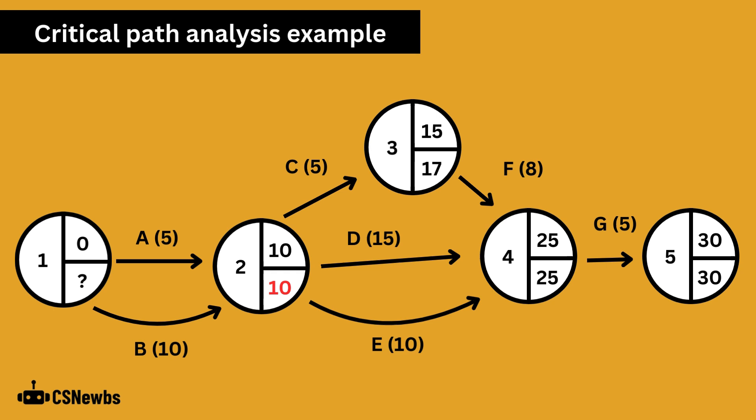The latest finish time of node 2 is 10. As from node 4, we take away the largest value, which is activity D's 15 days, so 25 take away 15 gives us 10.